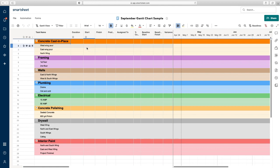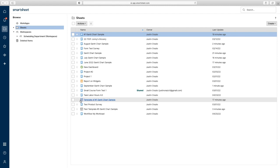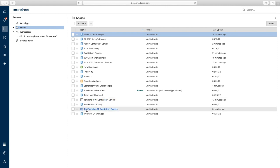This really comes in handy when you're working with a lot of different projects that you want to keep in the same format — especially if you're using forms that need to be used over and over but need to be saved under a different project. Also, if you save a sheet as a template and you have formulas in there, the formulas will carry over. If you have hyperlinks, the hyperlinks will carry over — it's super convenient. And that is how you create a template in Smartsheet: File, Save as Template. Once you do that, you'll have this icon that you can always go back to anytime you need to use it.